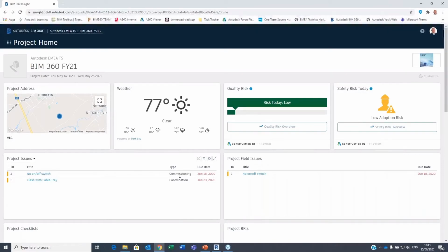Okay, so as you can see, we're assigning types. We're doing that to RFIs. I'm not going to go into RFIs today, but it's more or less the same thing as issues with a workflow attached to it. But essentially, we're filtering data, right? These issues, by the way, can come from the field, so I can have my mobile device and flag an issue or indeed create an RFI on my app. It gets synced to the cloud, and it will be flagged up in here.